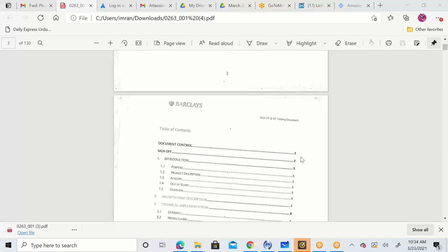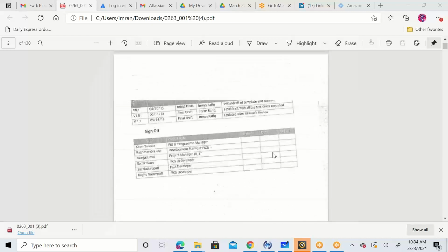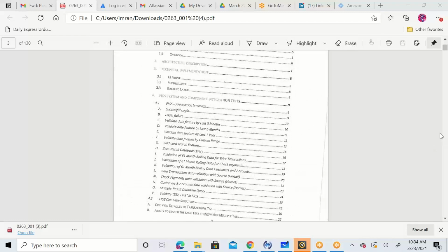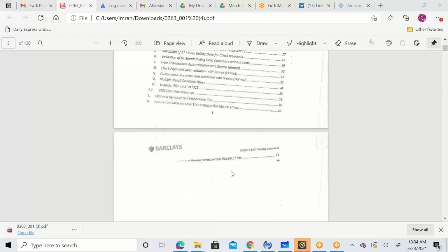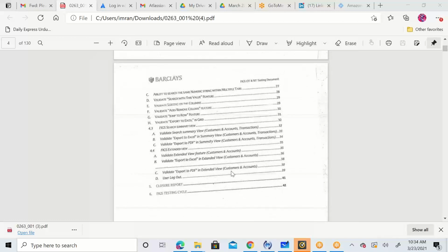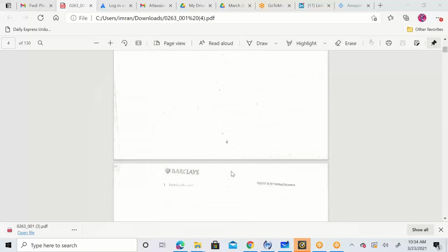That is called regression testing, and it is the same thing in documentation as well, that you need to reclone all those documents into a new one again. So if it's waterfall, it'll go through the same process. The whole FRD will be written again. You'll be copy pasting the existing FRD and then adding new features into the new template and getting approval on every single thing again.